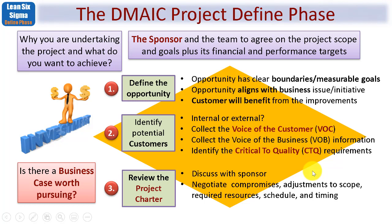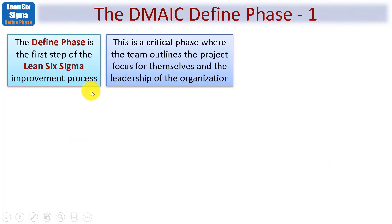Third, we need to review the project charter. The sponsor will normally provide a draft or initial project charter, and it's part of the Define Phase to refine it. We'll want to discuss this with the sponsor — negotiating compromises such as constraints and assumptions, adjustments to scope, required resources including people and budget, schedule, timeframe, and key timing aspects such as when each of the DMAIC phases starts and completes.